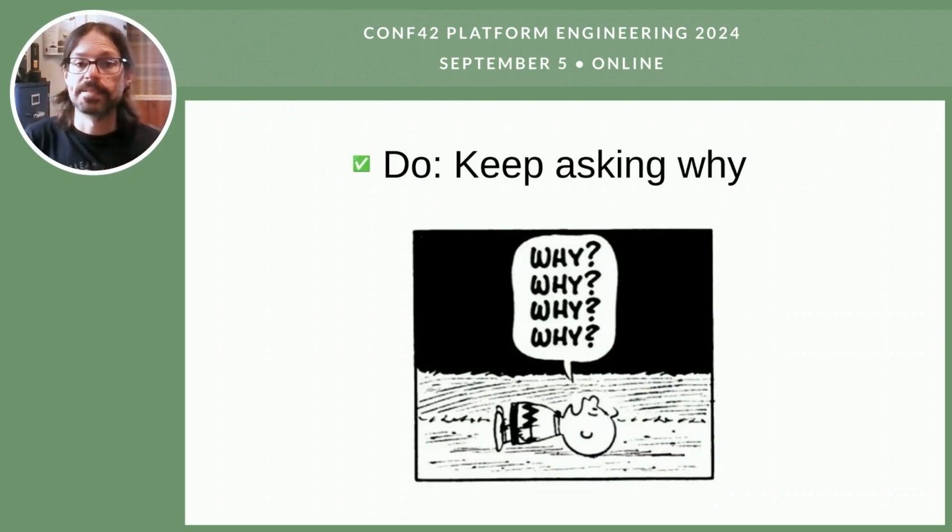That said, instead of rejecting, if it's a too wide problem that is raised, you can keep asking why. So try to get deeper into the problem to get more value out of it. For example, if somebody says that maybe the project failed because the server crashed, you can ask more questions like, what do you mean by server crash? Was it overloaded? Was it actual code that had an issue and the server application failed? Was it too many user logins at first, too much account creation? Try to get more and list them out, basically.